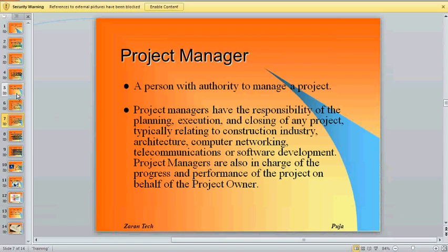For 4 weeks, it's 160 hours, right? And we said that we will need 3 developers. So how many total hours is that? 3 times 160? 480. If we say, just an assumption here, that the cost per hour for developers, salary or wages, is $100 per hour, what is the cost of development?